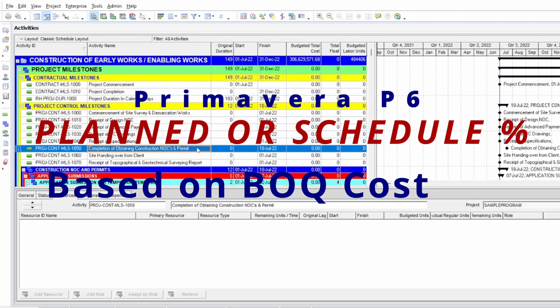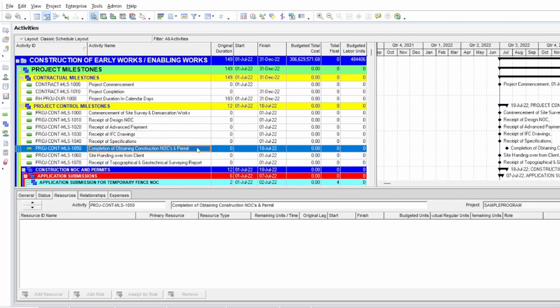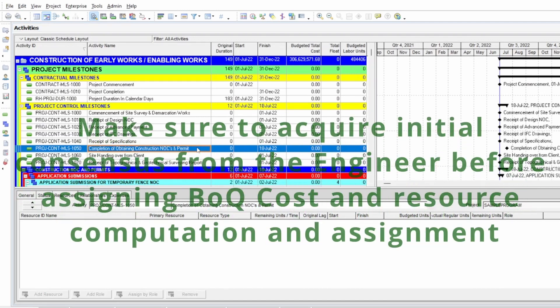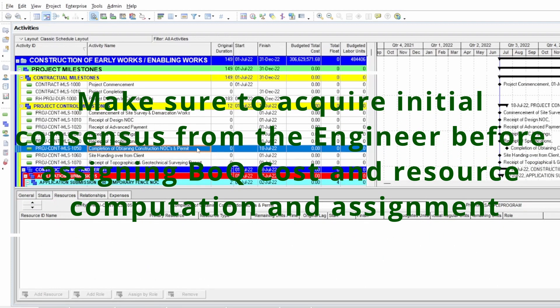Hello everyone. This video tutorial demonstrates the method we can use to compute the plan or schedule percentage complete from a Primavera program. When we are making a baseline program, we need to submit the progress curve, which is based on cost and resources. This video shows how to produce a progress curve for plan and schedule values based on budgeted cost and budgeted quantities.